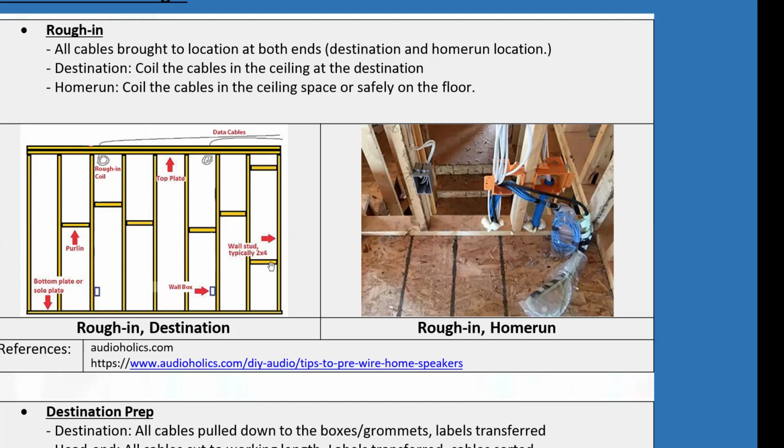So a rough-in could be considered a stage, and what I mean by that is, when you write up the contract with the client or with the general contractor, you can just say, after the rough-in stage, you expect so much money to be wired, or you expect a paycheck of so and so as part of the whole thing. And if the money is not in your account, then you have the right to not continue.